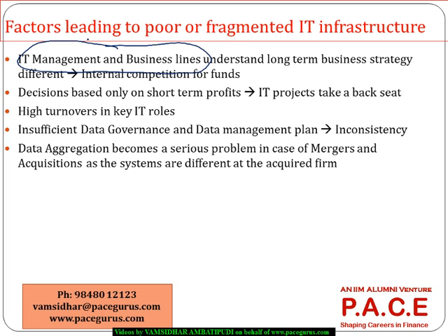Then the key people who are in IT. What is observed is that over the last few years there has been a lot of turnover. They have a wide variety of opportunities across a wide variety of businesses. So it is seen that employee turnover in IT related roles is very high compared to other roles, which has resulted in delays in many IT projects. So even that needs to be taken into consideration by the organization.